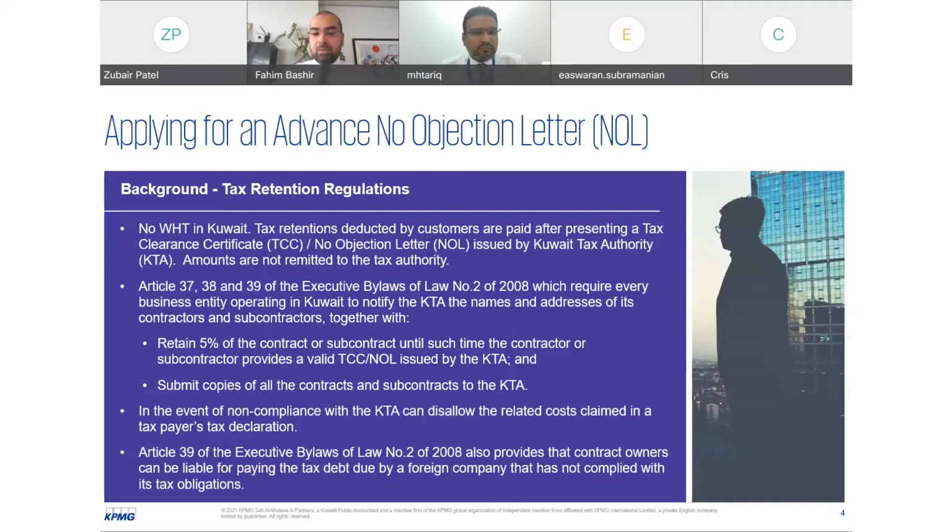And maybe Hanan, I can ask you, for our regional clients, what have you seen in terms of the difference that you see in the region and the questions that come from our clients that have operations in other countries? Yeah, thank you. I think most of the companies operating in the region get confused with tax retention regulations and withholding taxes. As you mentioned very clearly, there is no withholding taxes in Kuwait, and this tax retained by the contract owners can be paid back once they provide a tax clearance certificate.